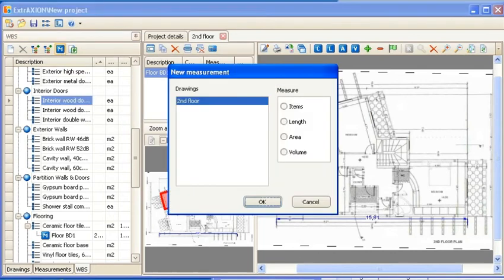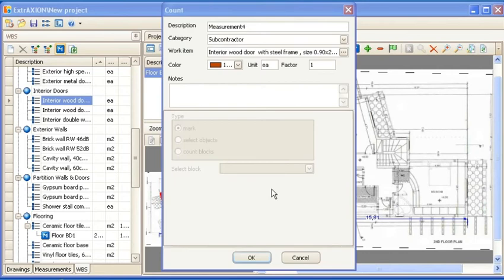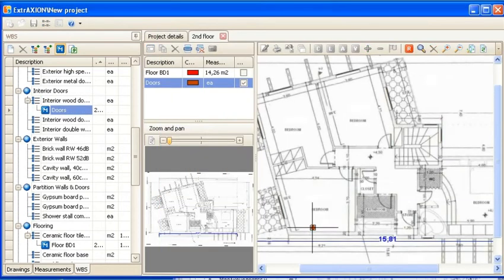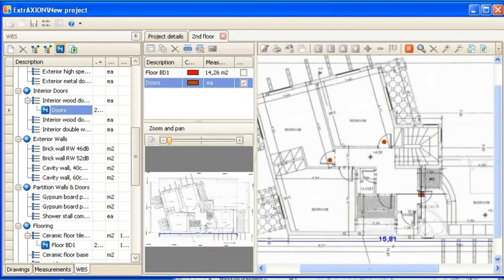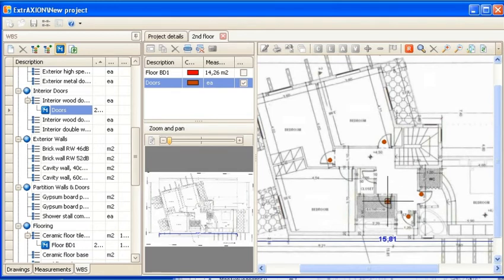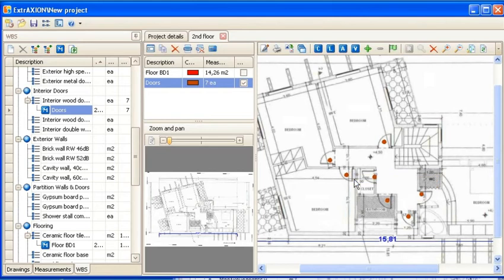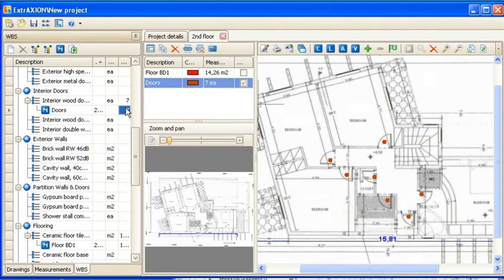You can also count items such as doors, windows, sanitary ware, etc. by marking them on the drawing. This helps to avoid forgetting or counting something more than once. The measurement result appears in the drawing measurement sheet and the WBS window as well.